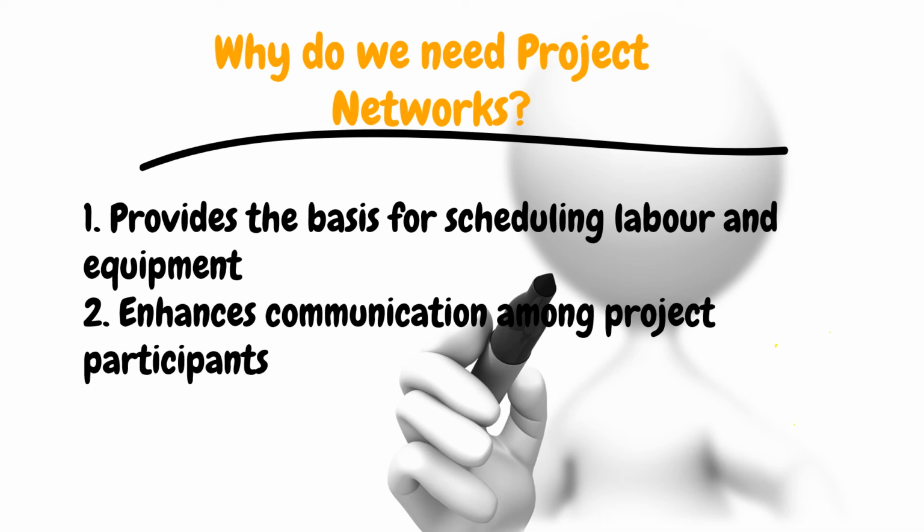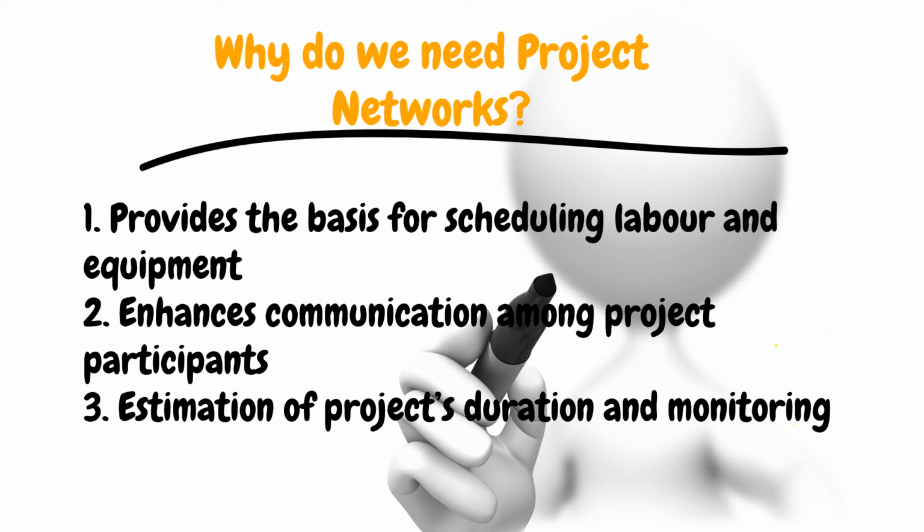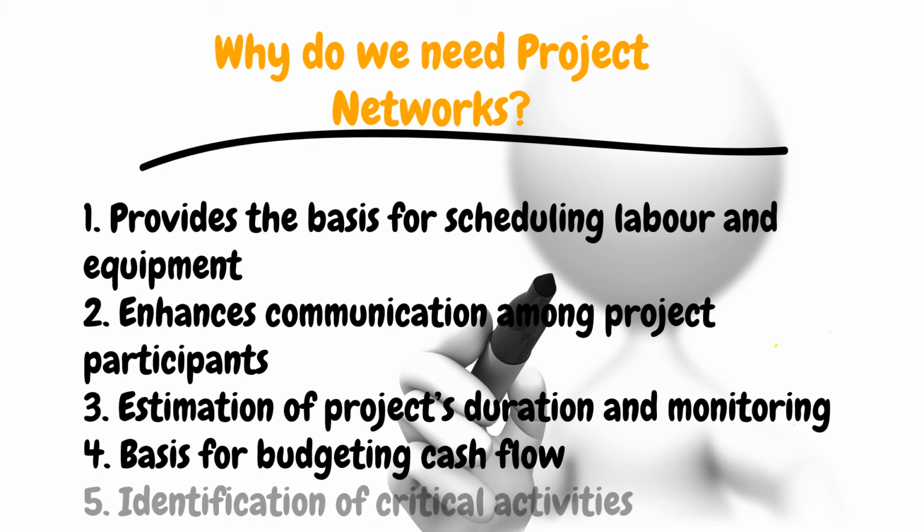It allows you to have a good bird's eye view of the overall project. Thirdly, it could lead to estimation of project duration and monitoring using critical path analysis, which we will be covering in the following video tutorials, and it provides a very valid basis for budgeting and cash flows. And also it leads to identification of critical activities. Critical activities are those where we have no float or slack, and these are the activities that must be delivered on time to ensure that the project meets its schedule and date.